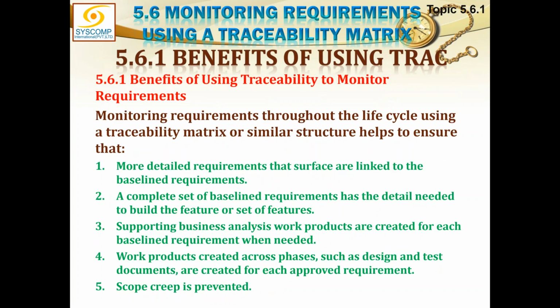Benefits of using traceability to monitor requirements. Monitoring requirements throughout the lifecycle using a traceability matrix or similar structure helps to ensure that more detailed requirements that surface are linked to the baseline requirements. A complete set of baseline requirements has the detail needed to build a feature or set of features. So all the features are explained as user stories.